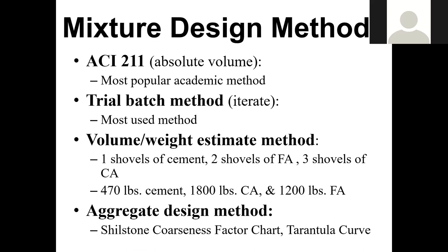There are different processes depending on your project. If you have a really expensive project, you're going to go through a mix design submittal process, where you know before the project even starts what that concrete is supposed to be. Then there's another where it's a smaller project, it might be less than a week, and you may have just one day of actual concrete work where you're going to be pouring concrete. That can be ordered a little differently. We'll go through some of that. But these are the different mix design methods.